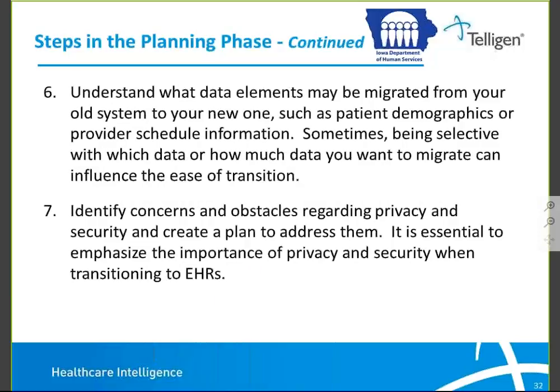Number 6, understand what data elements may be migrated from your old system to your new one, such as patient demographics or provider schedule information. Sometimes being selective with which data or how much data you want to migrate can influence the ease of transition. Typically, what we've heard in the past from folks who have done this transition from paper to electronic is people often make the mistake of trying to migrate too much information from the paper chart.